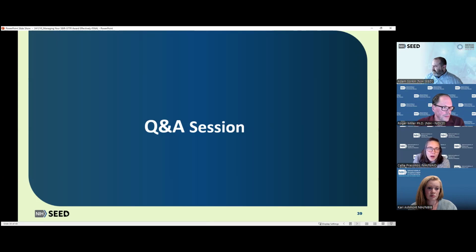They are not able to make any changes like the contracting officer. The contracting officer is more of the person to turn to for any changes, any deviations, any cost questions. But the COR is mostly for the technical aspect, the technical point of contact for the contract. Great, thanks so much, Callie. And then let's see.